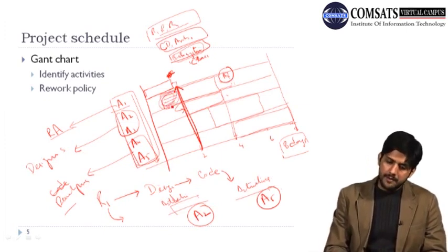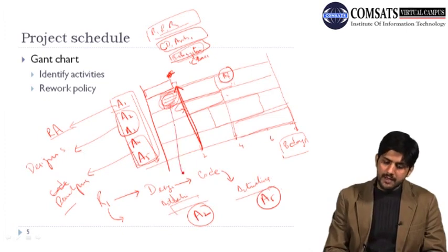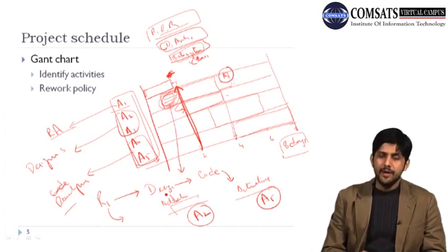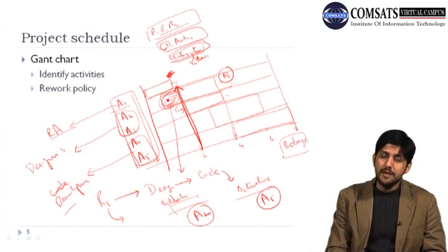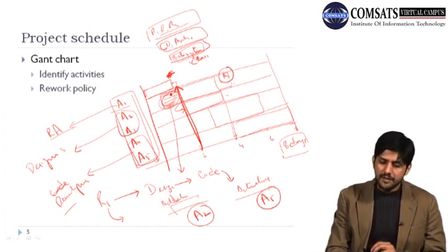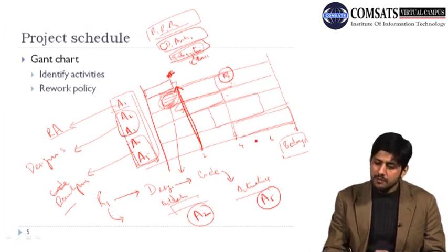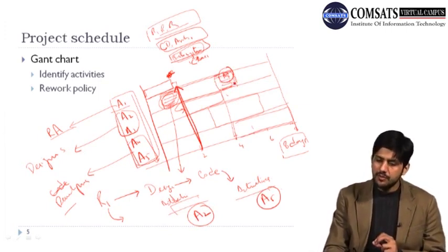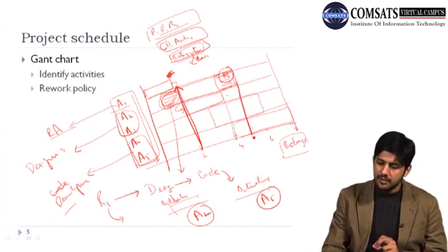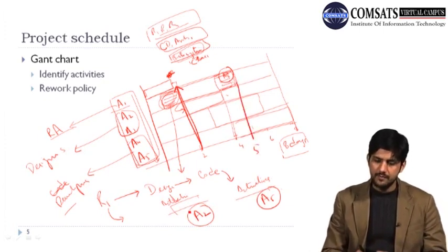Now, because this activity is affected, there would be some rework that might affect this completed work. So you need to add some extra work here. So you would say, okay, this activity 2 is going to take maybe 1 more day to complete because of this change. So activity 2, which was going to complete on day 4, now is going to complete on day 5.